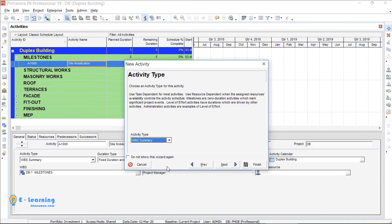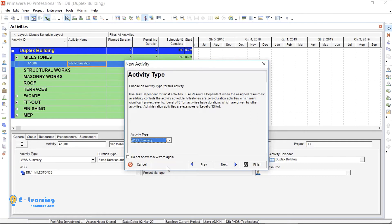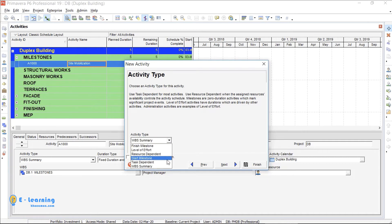Because this activity is a milestone, I need to choose between finish milestone or start milestone. My project starts with this activity, so it is a start milestone. I choose start milestone, then press Next.